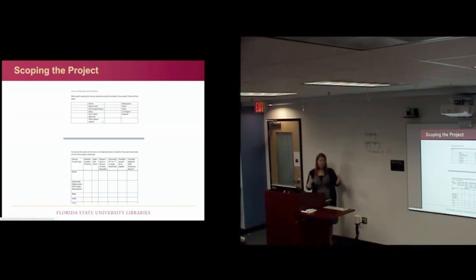So out of this form and out of those discussions, we'll do one of two things. Normally, because of who we've worked with in the past in the DLC, we take all the information we get from this, we build it into different documentation, and that goes all into what we call our project briefing, which I'll talk to you about in a few more slides. If we're doing something with more external stakeholders, like we're getting ready to do a project with, what church is it? St. John's Episcopal Church, I believe. We're going to put together a more formal project charter so that everyone signs off very formally with what we're agreeing to do and when we're going to do it. So depending on who you're working with, if it's just your project and it's your team, something very formal like a project charter might not be really necessary.